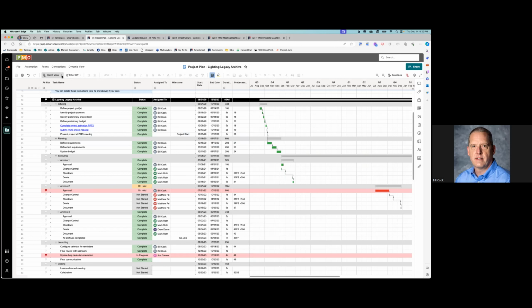And what I realized after, didn't take too terribly long, was that it was too much pressure on a project manager to have everything totally up to date all the time, because they don't have control of who will ultimately see the dashboard. The CEO could see the dashboard on any given day and start asking questions, number one. And number two, it just wasn't necessary, and it really complicated the back end structure of this whole thing.